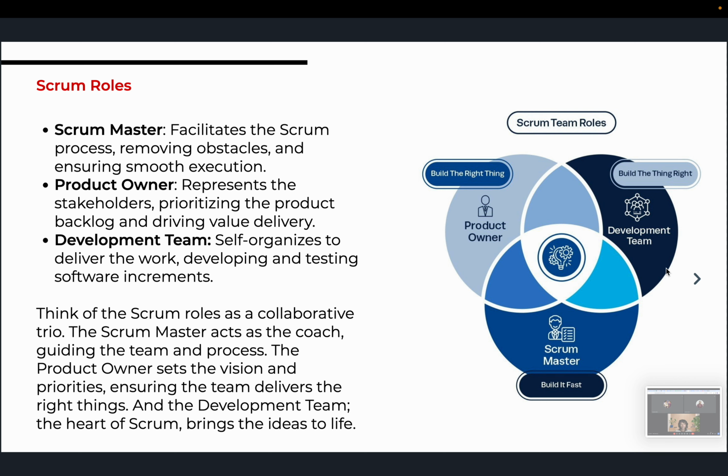So I want to believe you know what product backlog is now, but in case you don't know, remember you created an account on Jira and you were asked to create some epics and user stories. So all of that, the combination of it, is your product backlog, the user stories that have specific action to take, and the acceptance criteria for that action that is required. So we ask you to create some user stories because we are working on that product from the perspective of the user.